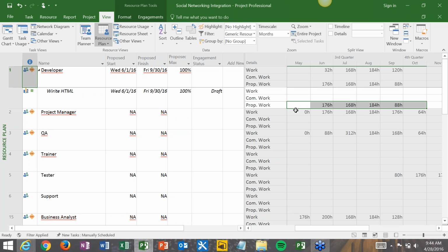All right. Any other questions? Yes. In our organization, the project managers are resource managers. Is there a good way for the project manager to quickly and easily identify the resource availability of all resources that could fill the specific role within the project plan itself? Yeah. When you build your team initially for a particular project, it'll show you right there how available each resource is within that particular period of time. So you can stay away from the people that are already overbooked and stick to the people that have some availability within that period of time.